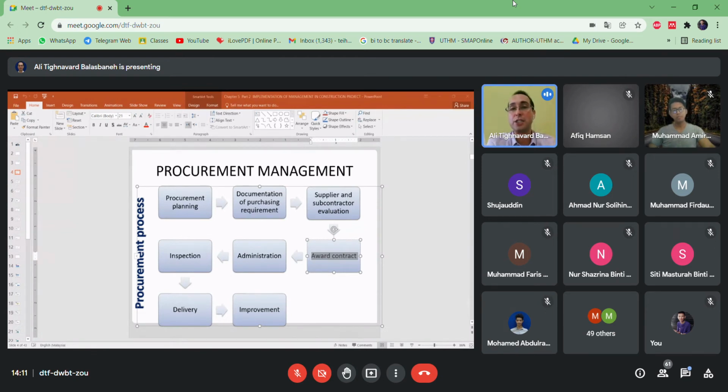Or sometimes there is another situation where you are a project manager or contractor for a sensitive building, like a military building, okay? Not everybody should have access there. So in that case, you select just a special supplier to provide the material.